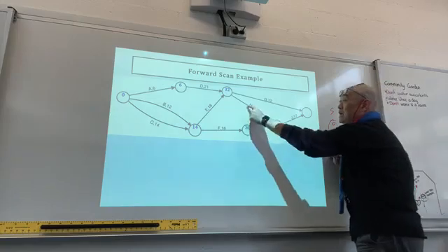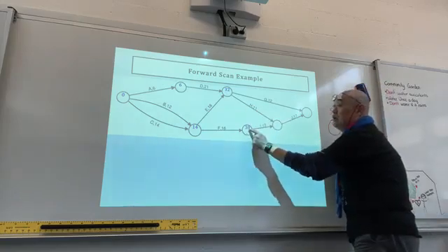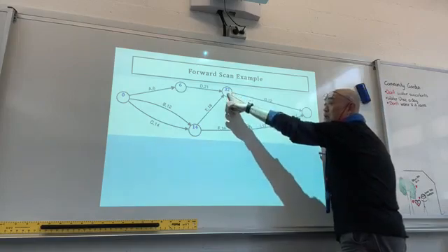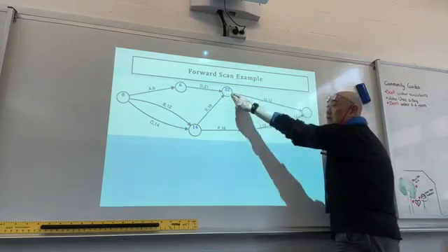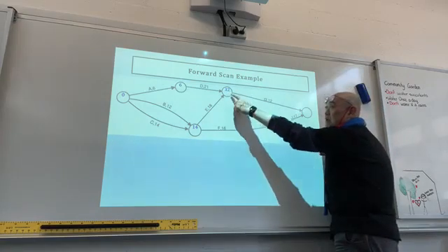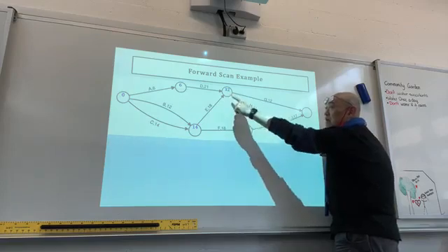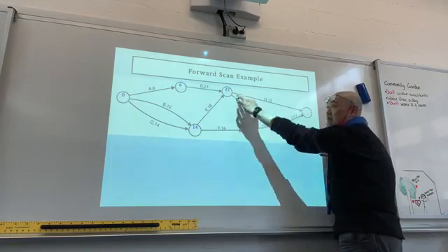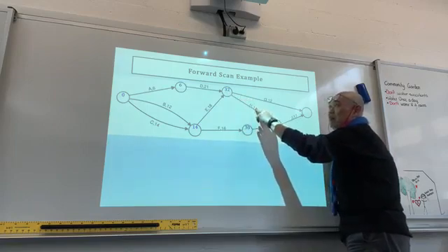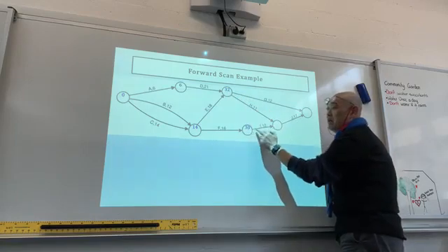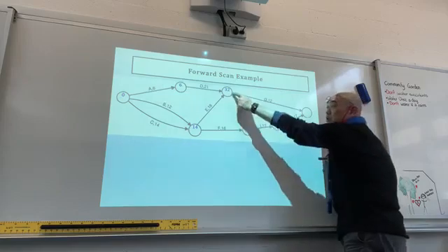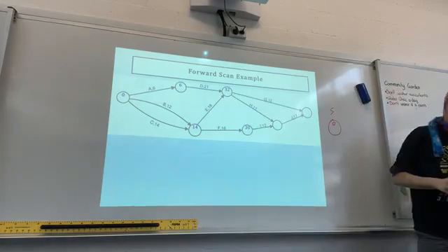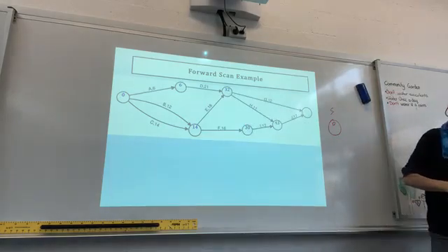Now again, between here and here, at this point I've already used up 32 minutes, and here I've used up 30 minutes. From here to here, I need to add 11 minutes, which gives 43, whereas that will be 32 minutes. So you need to put in the maximum of 43.